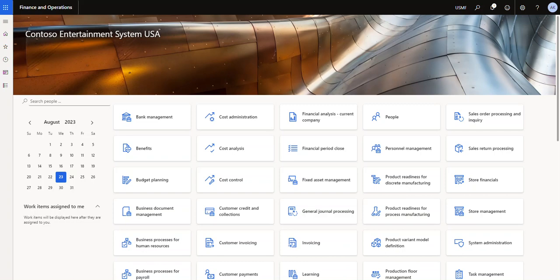And some of the nice things about project management accounting, if you think about it at its very core, a project is nothing more than a place to gather cost. So let me say that again. Project management at its very core is a place to gather cost. And those costs can be for research and development. So let's say, for example, you're doing research and development and you do a production order. Well, when you do the production order, you can associate it with a project. So that way all the costs from that production order get posted to that project.